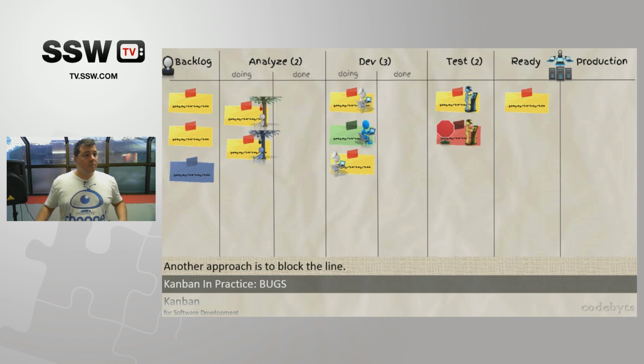So another thing that we can do, we're now back to, we reset the board to the time when our tester hit the bug. At this time, what we can do is what the manufacturing plants call stop the line. Just to give you a quote, Toyota introduced a system because Toyota said, to have the best quality that we can have in our factories, we are not going to let any defective part of the car proceed into the next lane. As soon as we see a defective part that we are working on, that we need to assemble or whatever, or in the inspection, and the idea is actually to catch it before it gets to the inspection, being our test, we are not going to let this go to the next lane. What we're going to do is stop the line, stop the whole manufacturing process.